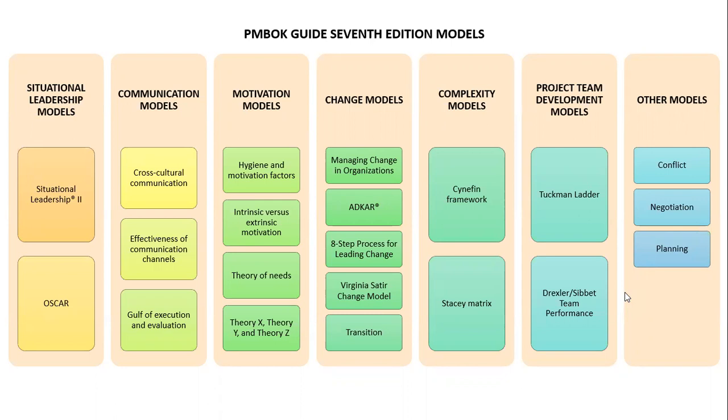All right, let's talk about planning. So here under planning, it says, Barry Boehm developed a model that compares the time and effort invested in developing plans to reduce risk, including the delay and other costs associated with over-planning. By taking more time to plan up front, many projects can reduce uncertainty, oversights, and rework. However, the longer time spent planning, the longer it takes to get a return on investment. Common sense, right? The sweet spot is different for every project. Therefore, there's no correct answer for the right amount of planning overall. This model demonstrates that there's a point where additional planning becomes counterproductive. Pretty much common sense.